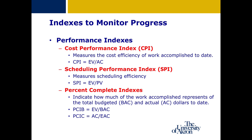There are also performance indices that help in monitoring project status regarding cost or schedule efficiency and identifying project trends. The cost performance index, or CPI, measures the cost efficiency of work completed to date. For every dollar worked on the project, the ratio demonstrates the return value — for example, a CPI of 0.70 means the project is getting 70 cents of value for every dollar expended. Organizations have found this to be one of the most reliable and stable measures for project status and an early warning of cost overruns. The schedule performance index, or SPI, measures scheduling efficiency to date.